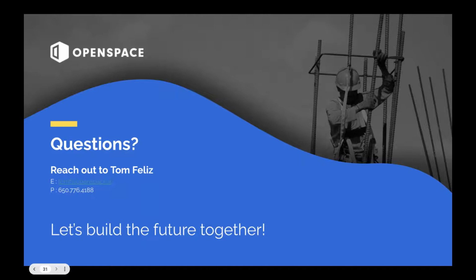And IPD stands for Integrated Project Delivery. A lot of these IPD teams use a contractual form, an integrated form of agreement, which allows all of the trade partners, the architect, the builder, the owner, and all of the trades to participate in this idea of shared risk and reward. So that teams are all aligned, not just on the schedule front, but on the commercial front as well. IPD is written about a lot recently.